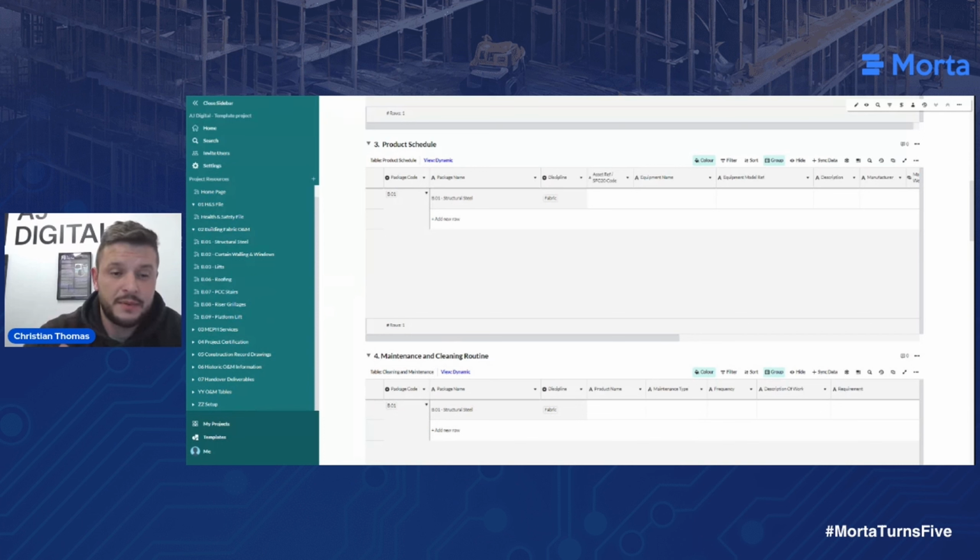Once it's fully accepted from a contractor perspective, in this instance, it can be handed over, or incremental access can then be given to the client. We can add a third review process from the client, so they can either sign off each individual element that's been uploaded, or they can sign off sections, or there's an option to sign off the entire O&M.